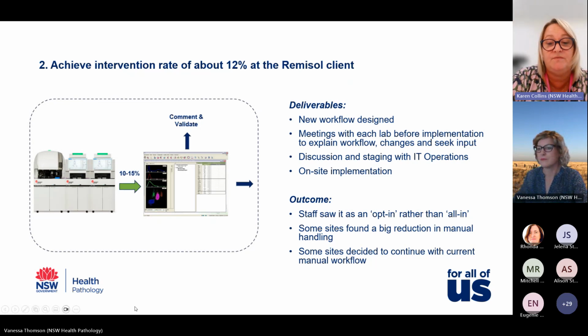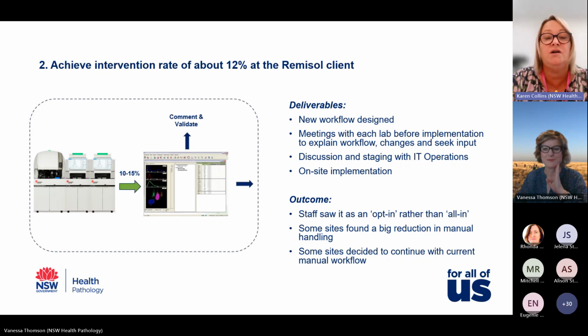We had meetings with each lab before the implementation to explain the workflow and the changes and to seek input and feedback. We discussed and staged with IT and operations, so everything was very scheduled, so things could be switched on at the right time. And then the project team travelled out to every site on the days that the go live occurred. So we were there to iron out any problems and make sure that the workflow continued to move smoothly.